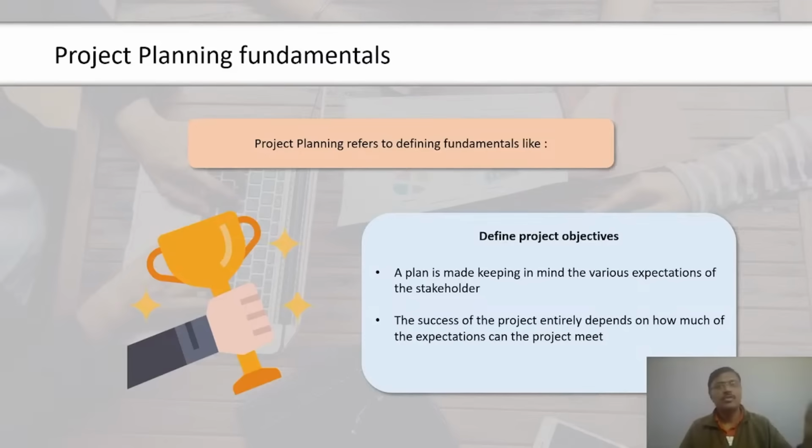When approved, this cost budget becomes the cost baseline of the project. Project cost performance is measured against the cost baseline, that is, how much more the project would cost compared to the original cost baseline. The cost baseline includes all authorized budgets, but excludes management reserves.